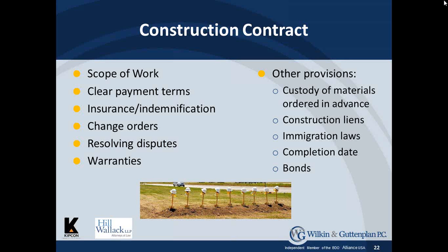Construction liens are an issue, so you have to make sure that when you pay the contractor that you get sign-offs from all of the subs prior to disbursement. Each sub is entitled to a construction lien, and you want to protect yourself against those. Another concern relates to materials ordered in advance, both as to custody and payment. The key term, and Mitch mentioned it, you always want to owe the contractor money as opposed to allowing the contractor to get ahead of you.